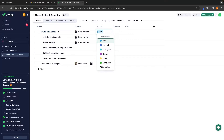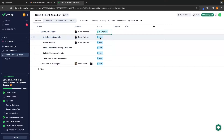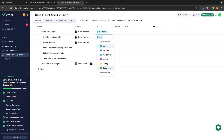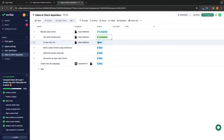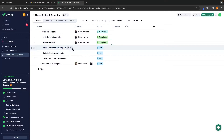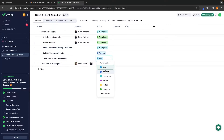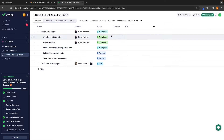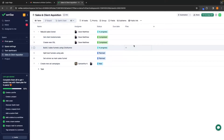So what we can do is go to the main 'Rebuild Sales Funnel' and set this to In Progress. Then 'Get Client Testimonials' we can say is Completed. 'Create New VSL' — Completed. 'Build Two Sales Funnels Using ClickFunnels' — In Progress. And then these other two to Planned. This is now going to show everybody on the team where each of these individual tasks are in terms of status.